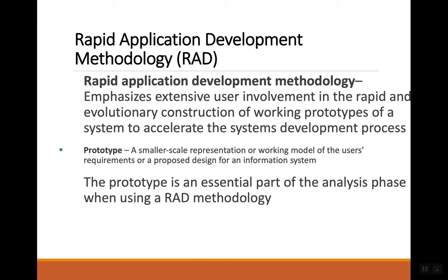RAD is another technique. The idea of RAD is that it has some similarities to agile. Extensive customer involvement, evolutionary construction, the idea of developing working prototypes, and then building, enhancing and elaborating upon those initial prototypes. So the idea is that in the analysis phase, you develop a prototype as part of the analysis phase. People can actually see a working version of something prior to committing the full investment of effort around the application development.